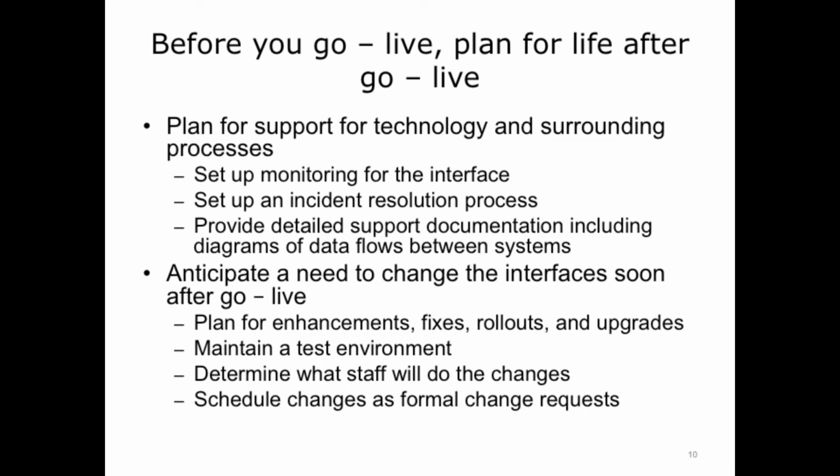Plan to assure that your implementation will be well supported. Make sure the technology and the surrounding processes will be supported. Make sure there is support technology and staff in place to ensure that the interoperability will continue to work and that service disruptions will be quickly detected and restored. Also, it is quite common that production will need to be changed. Plan for the availability to continually upgrade production. Make sure you have change control processes in place and test systems available separate from production. We will discuss supporting production in more depth in the next lecture.